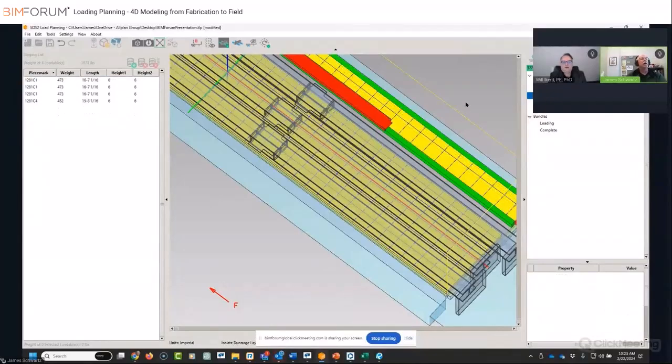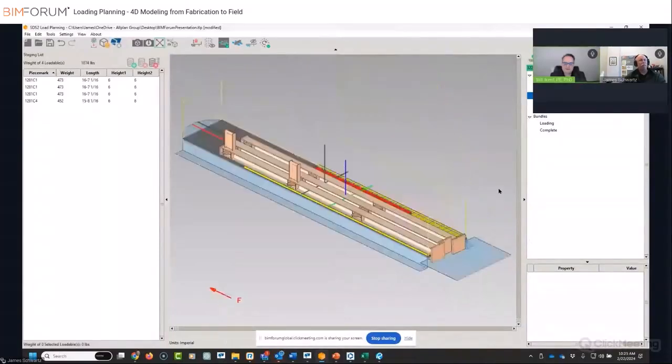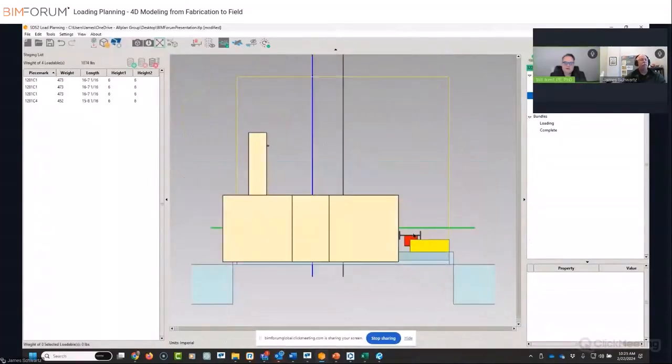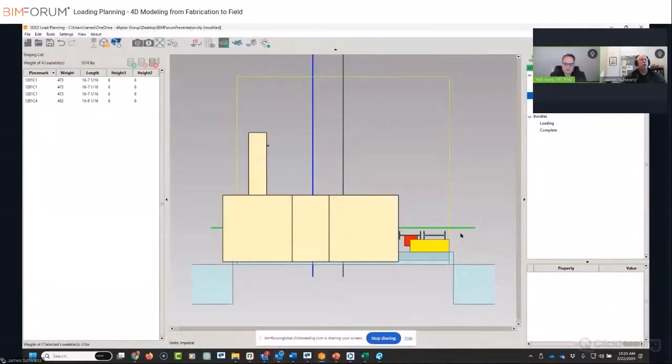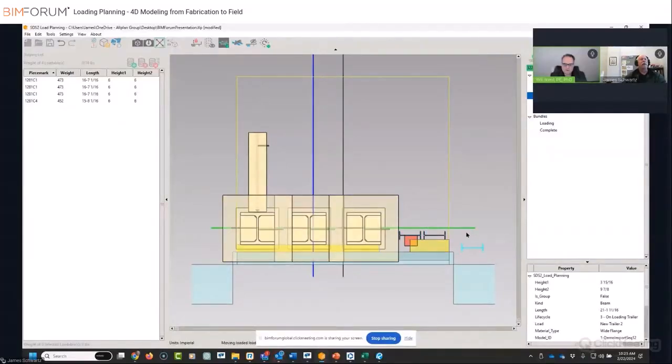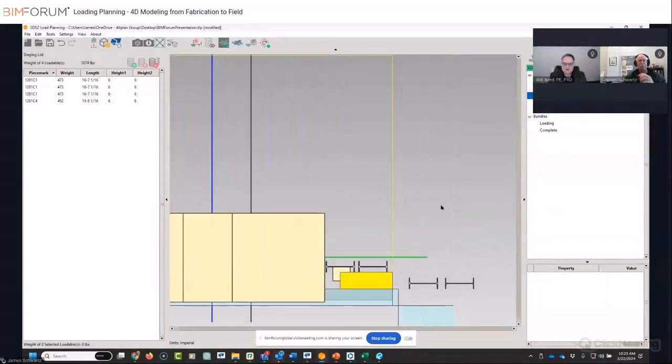While you're working on this, James, one question I wanted to pass along is how many of your clients are having trailers where they're staging them, parking the trailer, disconnecting, and bringing staged trailers where you're doing your picks of steel as you erect, versus having a shakeout area on the job site where you actually touch each piece of steel at least twice?